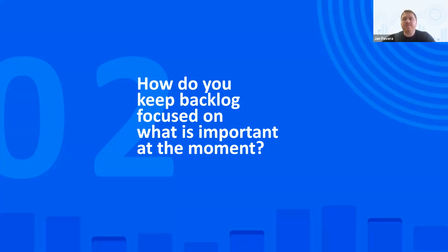So, from my experience, if there are more than 40 items in the stage, I need to clean it up, reorganize, or put items back to the inbox, or remove them from the backlog and start a discussion with the client or stakeholders about whether it's really so important, for example.